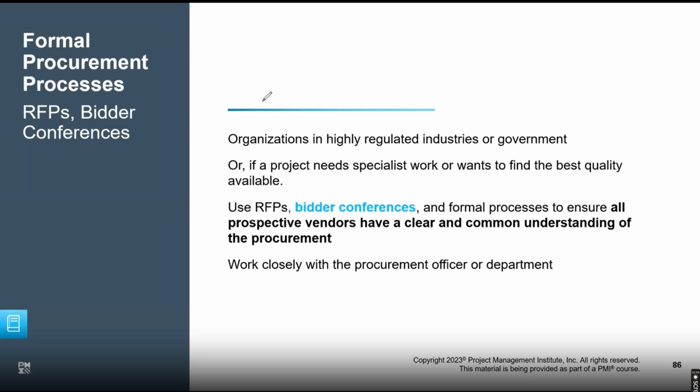Again, the sequence might be different in different scenarios. People can customize, but all in all, initially you have your SOW. Based on the SOW, people go for an invitation for bid, IFB. I think it's not fair to let them quote before, because you will eliminate some vendors while the full picture is not clear for them. The pricing methodologies may also change with them. So disqualifying them based on price during the RFQ stage would not be fair.